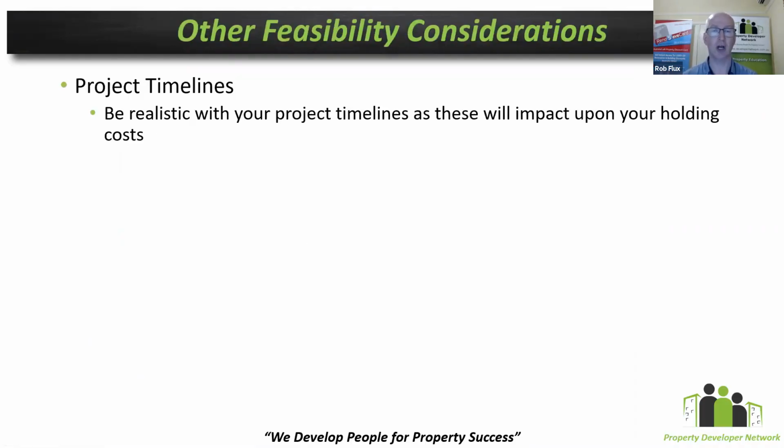So the project timelines, okay? This is going to impact your holding costs. You need to understand how long it's going to take you to get your development approval. And that is going to be very subjective based on the council that you're dealing with, the kind of project that you're dealing with, and also the complexity of that, because some councils have a fast track process and others have a very slow and laborious process where you need to get feedback from the entire community and that sort of thing.